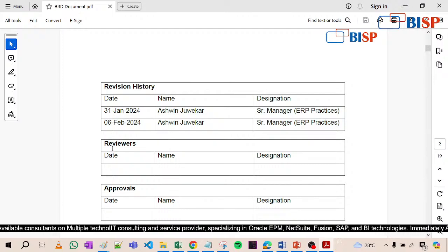because suppose your projected deadline is 6 months, right? But the project ended in 9 months. So the client will ask you why it took so much time. In that case, we can show that requirements changed each and every time, so that is why it was revised. So we can show them the revision history also.